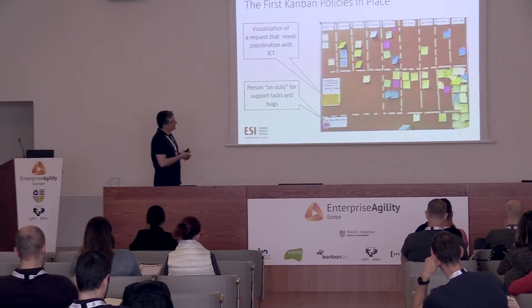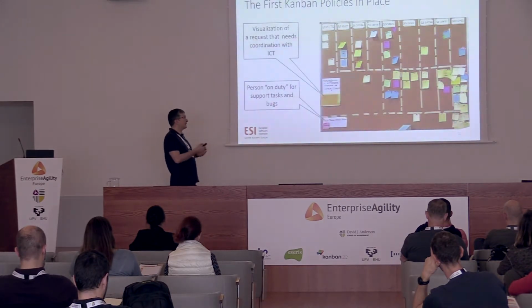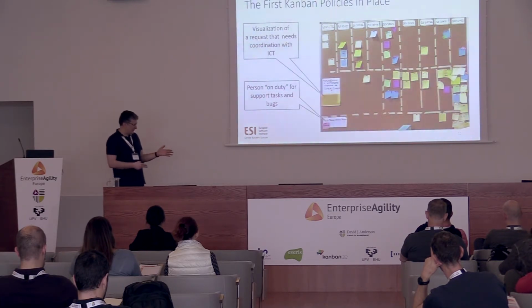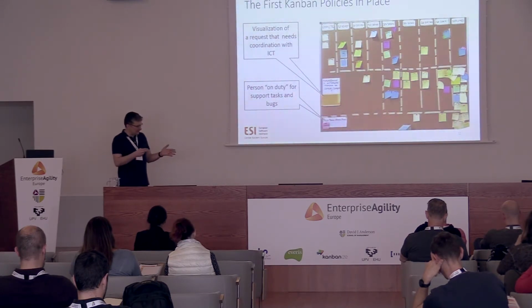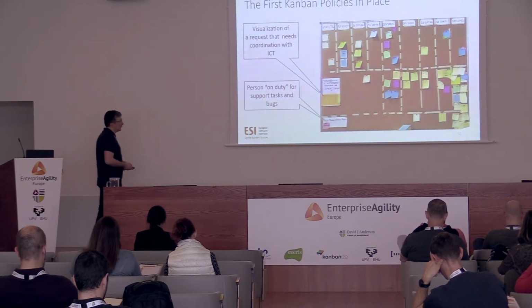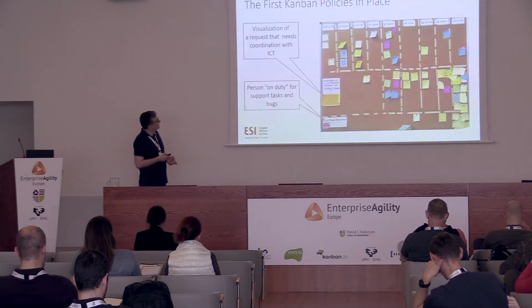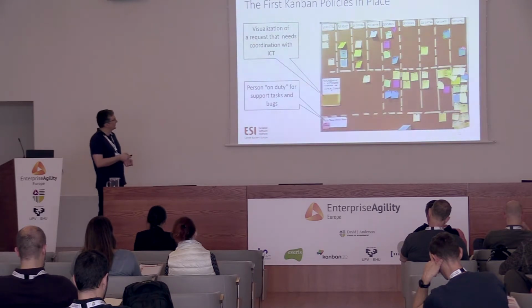So the initial idea, actually, I think I somehow proposed this marking with, they said we have to mark, but I proposed it with sticky notes, and my original idea was to put the orange one when we discuss with the ICT, and then to put a green one when it is resolved. Actually, the team invented a better way. I'll talk about it in the next slide. But this was the way to synchronize communication with the ICT team and to start early.